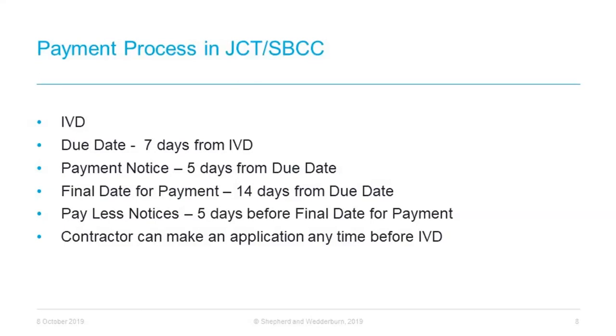The contractor can make an application for payment at any time before the IVD. As I've just mentioned, the next stage in the payment process is that the due date is 7 days after the IVD. 5 days after the due date, the employer must issue a payment notice. As we mentioned earlier, nearly all construction contracts provide for this 5-day timescale for the payment notice. The payment notice specifies the sum that the employer considers to be due to the contractor on the due date and the basis upon which that total has been calculated. Notice that this mirrors the wording in the legislation. Subject to any PLS notice being issued, the employer must pay this amount before the final date for payment.